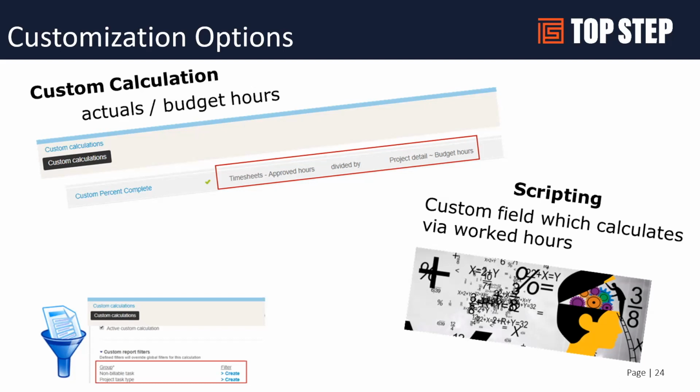We've also had scenarios where a customer needed a custom percent complete that's actually stored on the project properties. And generally the use case there is because they have a financial system that they need to send that percent complete to, and they can't use the native percent complete. And we generally see this when a customer does mix and match T&M and fixed fee in the same project.